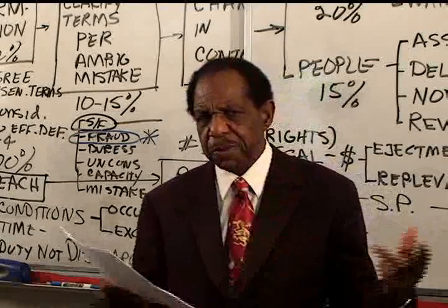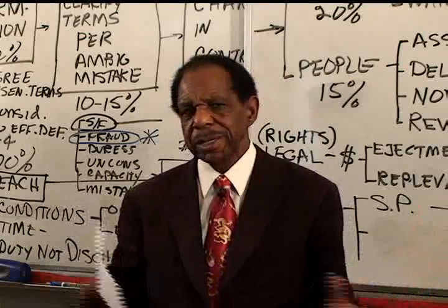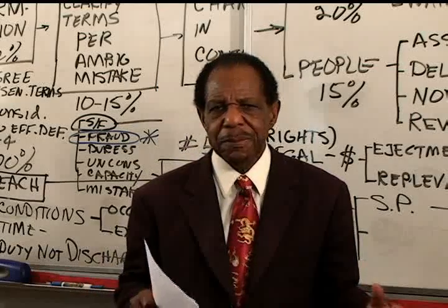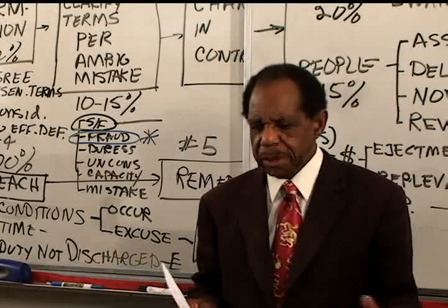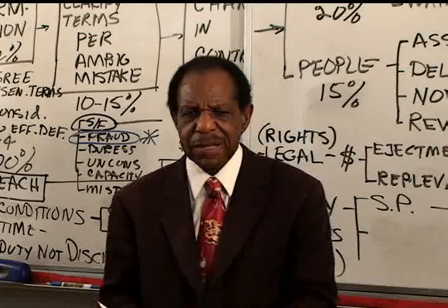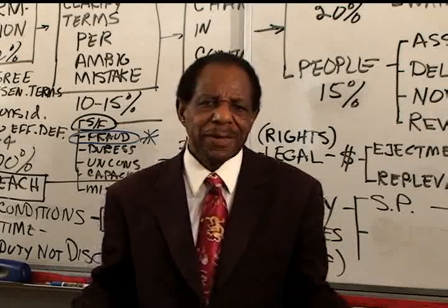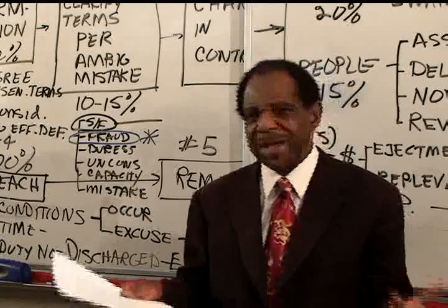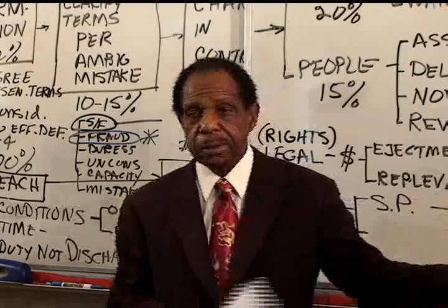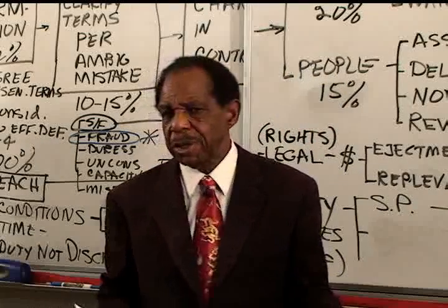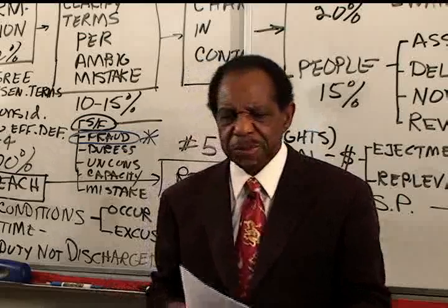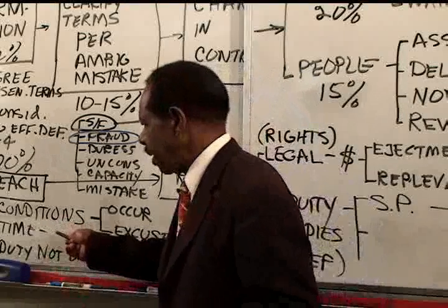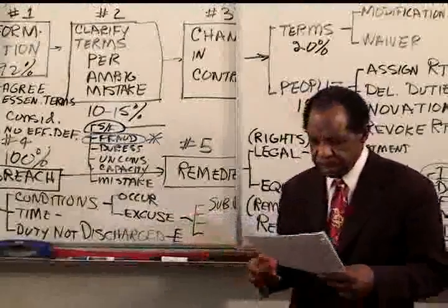Here, this person's building a garage next to somebody's house, and it's in the summertime in April and May. And they say time is of the essence, but there's nothing about the facts here that makes a 10-day late finish particularly important. It's a minor breach, and you pay a dollar or something for the minor breach, but it's not a material breach because time was not really of the essence. So that's what happens with the time is of the essence. It ends up being a minor breach.